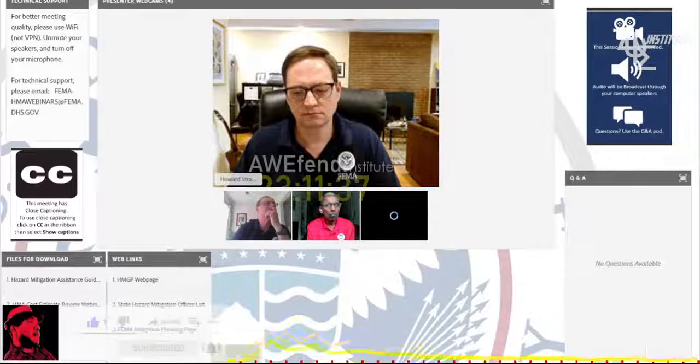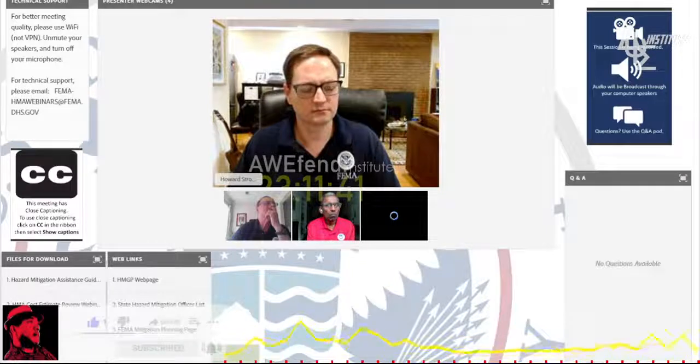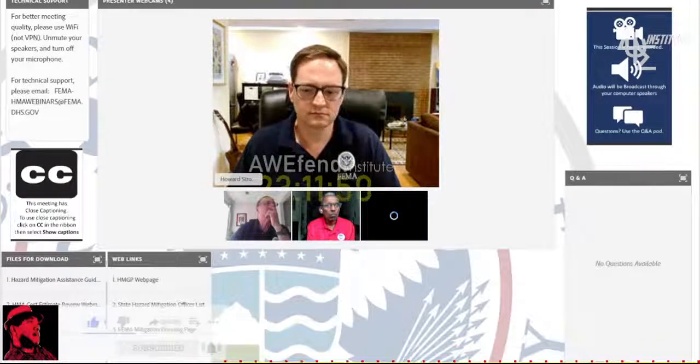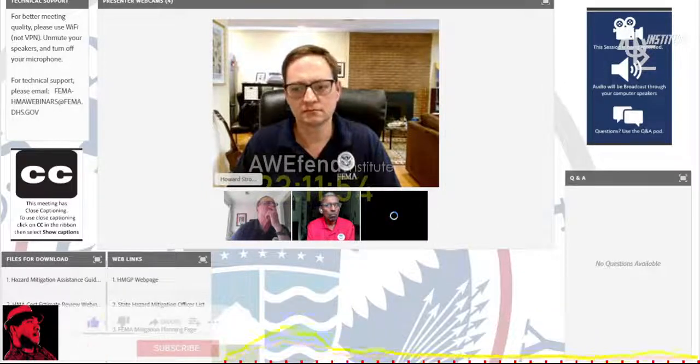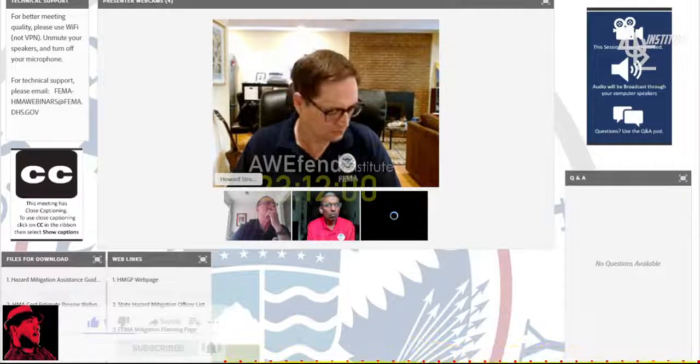And on the time of managing the project, I want to raise another point here. Project management cost is different from grant management cost. A project management cost goes in the cost estimate and is an eligible item. Grant management cost, subrecipient or recipient management cost, doesn't go in the cost estimate. This comes from totally different funds and has nothing to do with the project management cost itself. I think with this, I will end this question.